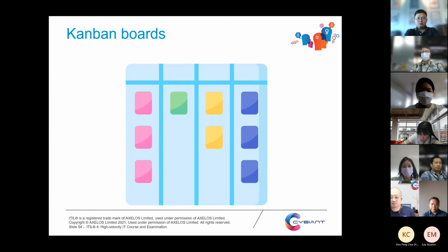So a Kanban board is actually very good for individual productivity or as a team tracking tool. And typically we use this on a daily stand-up. That means every morning you have a fixed time. Doesn't matter if it's 8:30 or 10 o'clock. You spend 15 minutes explaining what is happening from the task that you are taking up to do and whether you need help.